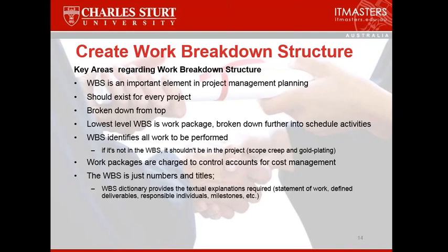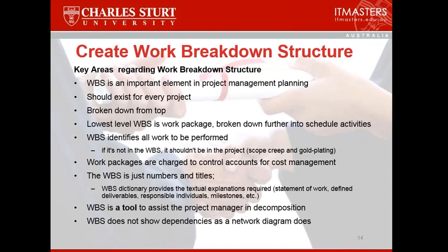The work breakdown structure is just numbers and titles. There is what's called a work breakdown structure dictionary. The dictionary is almost like a work instruction. It has things like statement of work, defined deliverables, responsible individuals, the milestones, everything that is required for people to go off and do the work. So that's the work dictionary. The work breakdown structure is a tool to assist a project manager in decomposition and does not show dependencies as you will find in a network diagram or in a schedule.